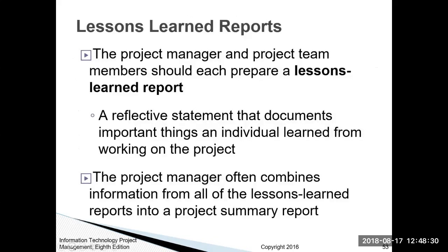And in your lessons learned report, the project manager and project team members should each prepare a lessons learned report. This is how you communicate what happened throughout the entire project, anything good or bad, and what you don't want to repeat or happen, or what you want to prepare for if something terrible happened throughout the project. And it'll include a reflective statement that documents important things an individual learned from working on the project. The project manager often combines information from all of the lessons learned reports into a project summary report.